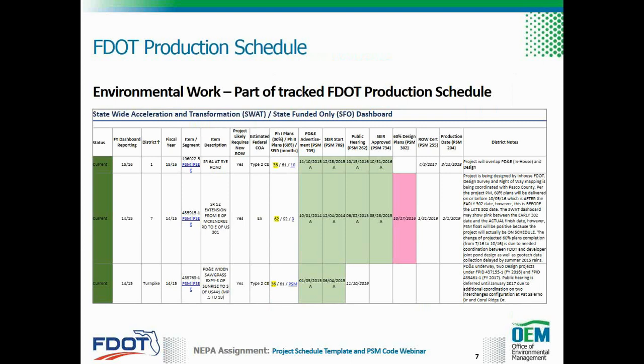This slide shows a snapshot of the state-funded project dashboard. These dashboards will track how each project is progressing and will be reviewed by the FDOT Executive Board each month. The dashboard pulls major milestones from the schedule to populate the field, and in this particular example, you can see that major milestones like public hearing and SEER approval have an identified PSM code.